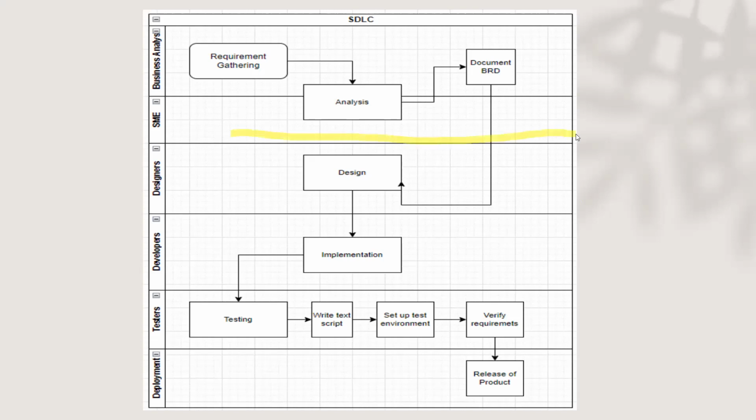Don't forget, at this phase, we have our freeze. We have discussed all that we needed at this phase. By the time we are handing over to the design phase, there is a freeze on requirements. We will not come back to requirements. If, for instance, a requirement needs to be changed, we are going to go through what we call the change management program. And we need to get approval because it is going to have an